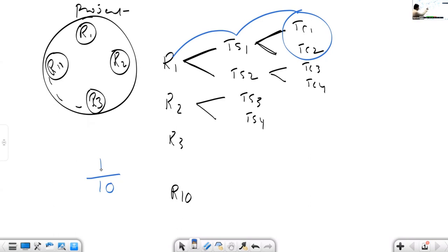See, who will update all this? I allocated the work to my team members. You write scenarios for requirement 1. You write test cases for requirement 1. Once the scenarios are prepared and test cases are prepared, they are going to update the appropriate sections. Say today evening, this is the status. After writing scenarios and creating test cases, team members update the appropriate sections. Supposing I created test cases for scenario 1, I map the test cases to scenario 1 in the RTM.